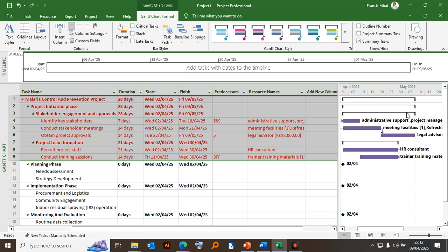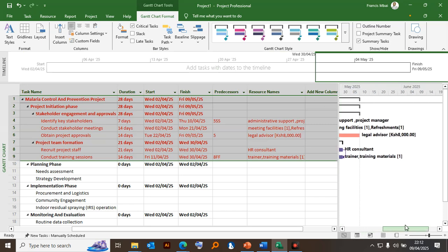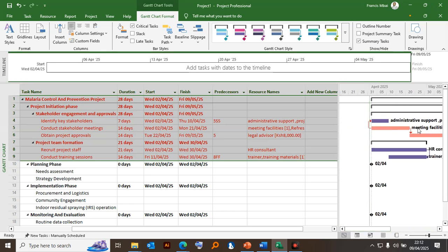Focus here. Your focus should be here. What is happening? Orange in the screen. Orange color, isn't it? So it is simply telling us that these are critical activities. They can affect the completion duration of your project. That is what the system means. So I can uncheck that.